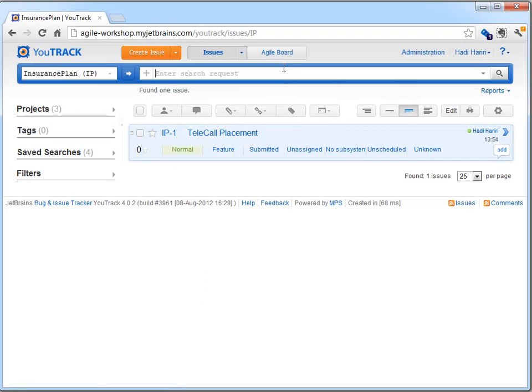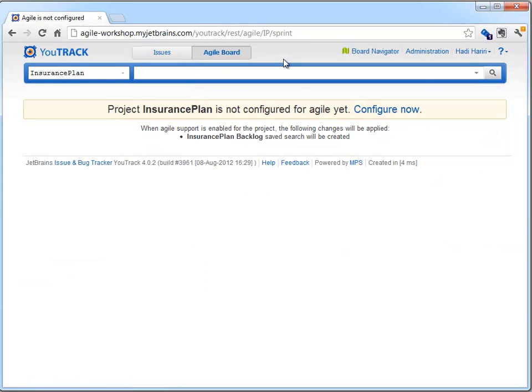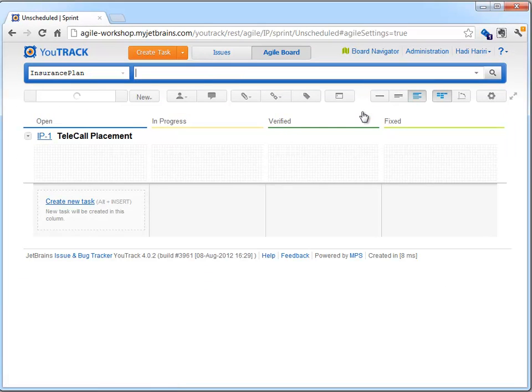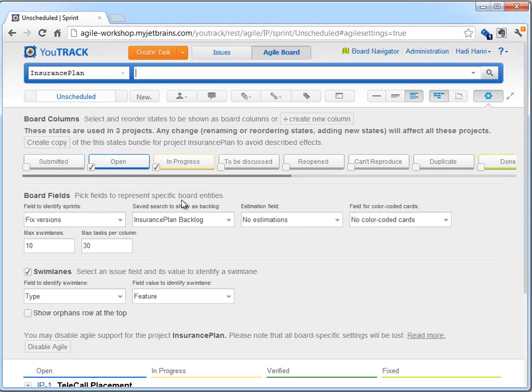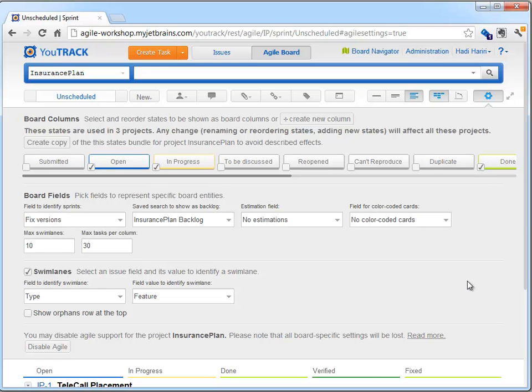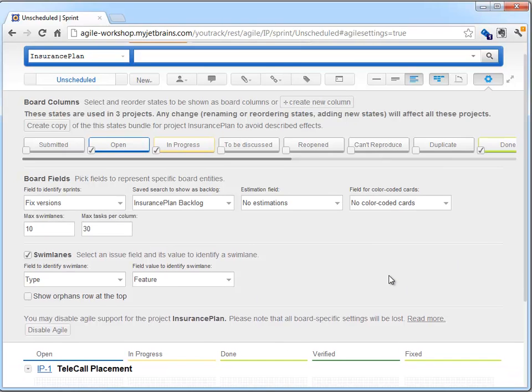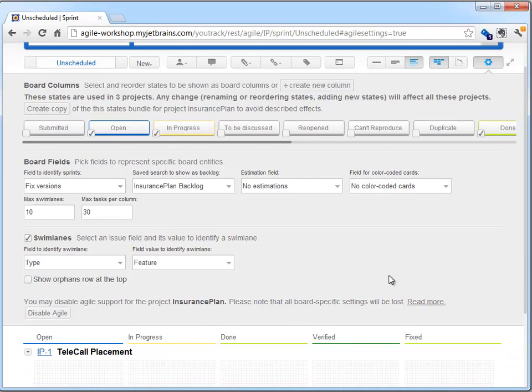Setting up a Scrum board is merely a matter of clicking a link and defining what columns we'd like present on our board. By default, the common values corresponding to the states of Open, In Progress and Done are automatically selected. Although this is all configurable, as are features such as maximum amount of tasks per column, whether we want estimation fields, definition of our backlog, etc. The default out-of-the-box settings are usually sufficient.